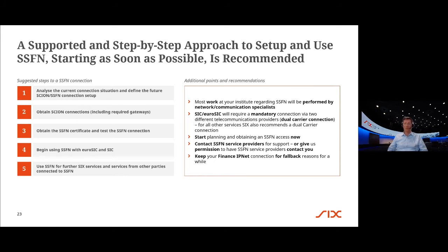I think also, and this is really also the question that I just asked beforehand, we would suggest that you start planning for your SSFN setup now, early on. While we do, from experience, think that it'll take on average somewhere between 3 and 6 months, I think it would still be prudent to start planning now, just because especially the 1st step on the left-hand side, the planning,